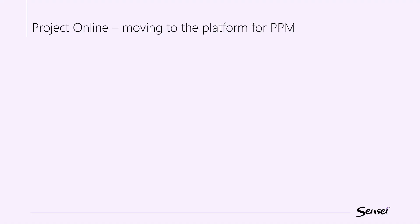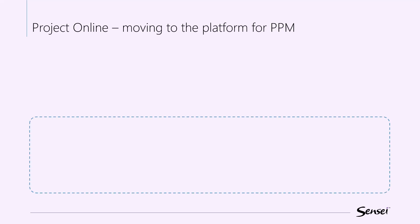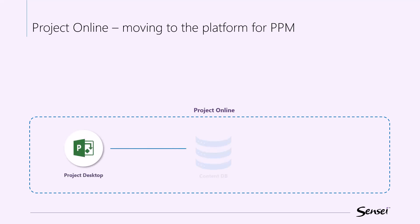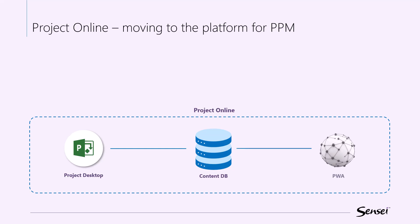You can think of Project Online as an umbrella term covering three pieces. Project Desktop is focused on the detailed scope of the project — the schedule with tasks and assignments primarily. The content database is where the schedule is saved when using Project Online.